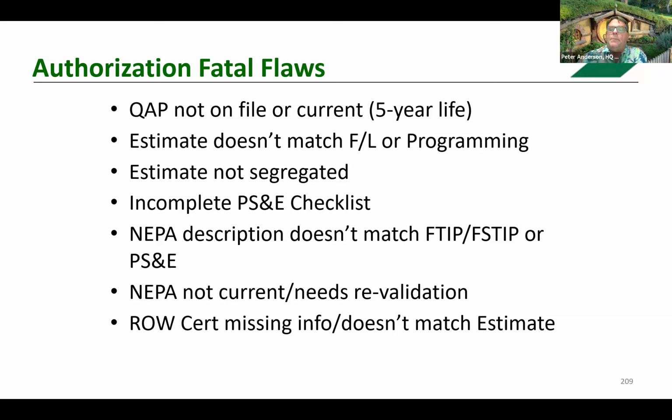We have an incomplete PS&E checklist. Of course, the NEPA does not match. Again, NEPA is not current and needs to be revalidated. The right-of-way description is not consistent, and again, it's missing information or does not match any estimates. Utilities are shown on the estimate, but not included in the right-of-way cert.